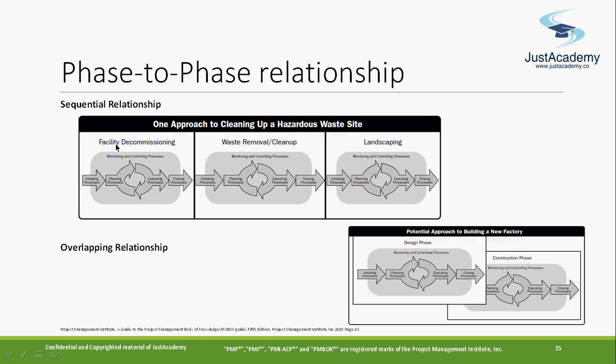For facility decommissioning itself, they created small projects. They created a plan for how to decommission this. What will be the resources I need? What are the equipment? So there's one project run in this. So this facility decommissioning is done. After that has been done, then the next phase started. For that they created a small project. Maybe facility decommissioning they have done in 2 weeks. They took a break. Once the budget comes, they started the next phase. So these are the activities they are doing in sequence, one step at a time.